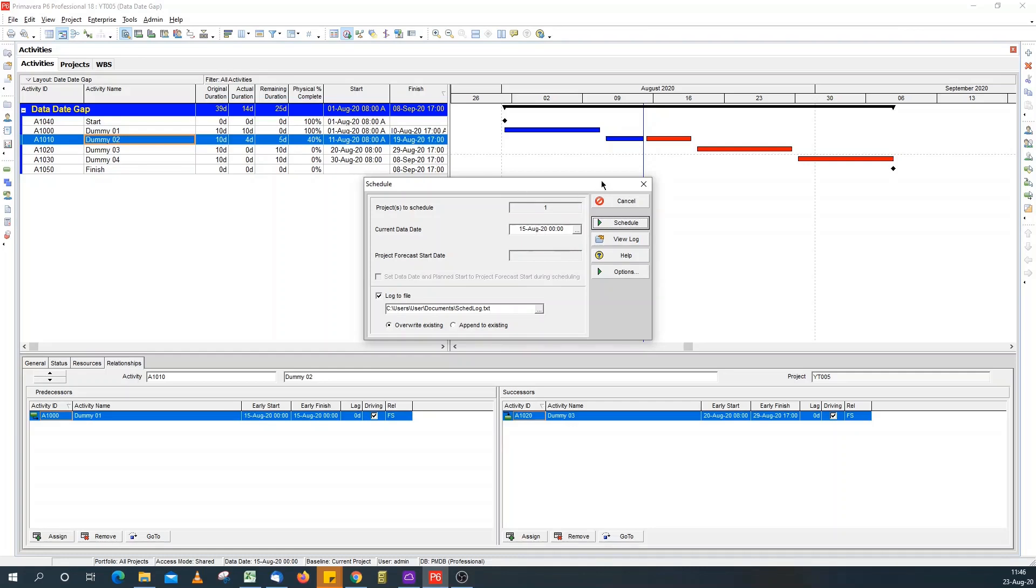This gap that appears here is the difference between this data date, which is 0100 hours, and the 0800 hours when the remaining activity starts.